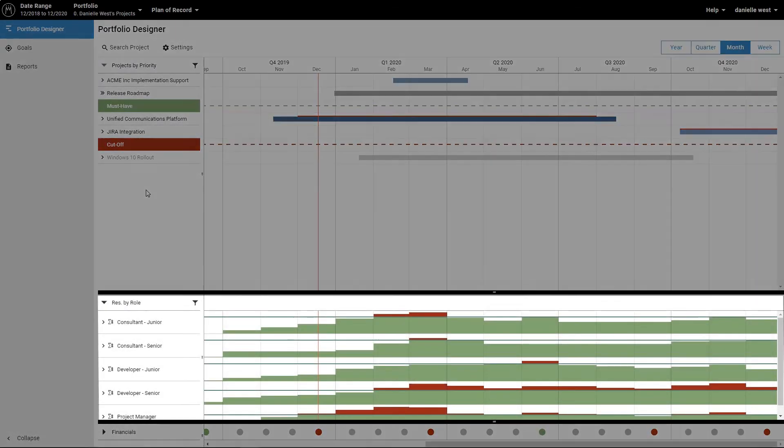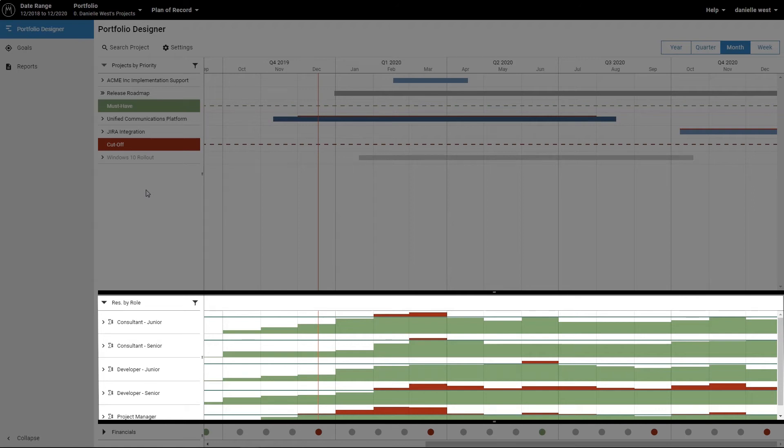The resource section displays employee workload. The absolute capacity of the roles or individuals is indicated by a green line. The workload is represented by green or red areas, depending on whether they are below or above the capacity line.